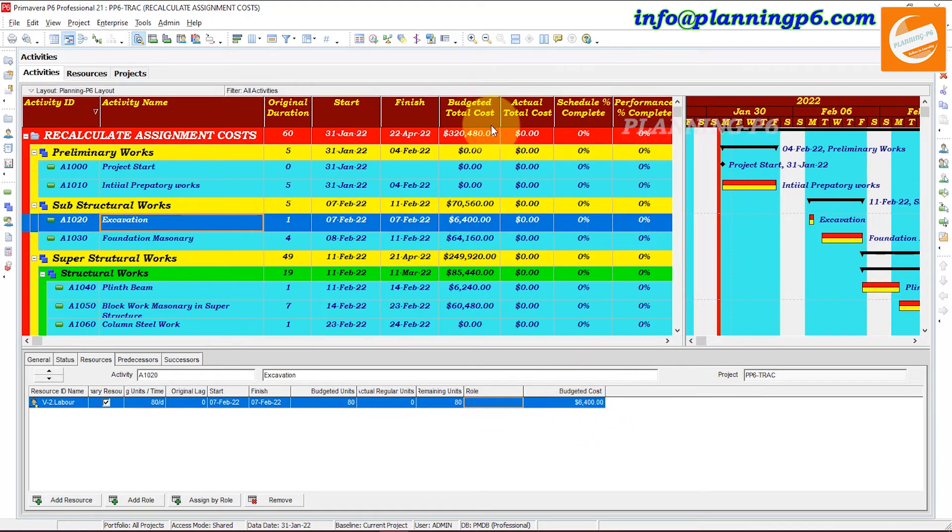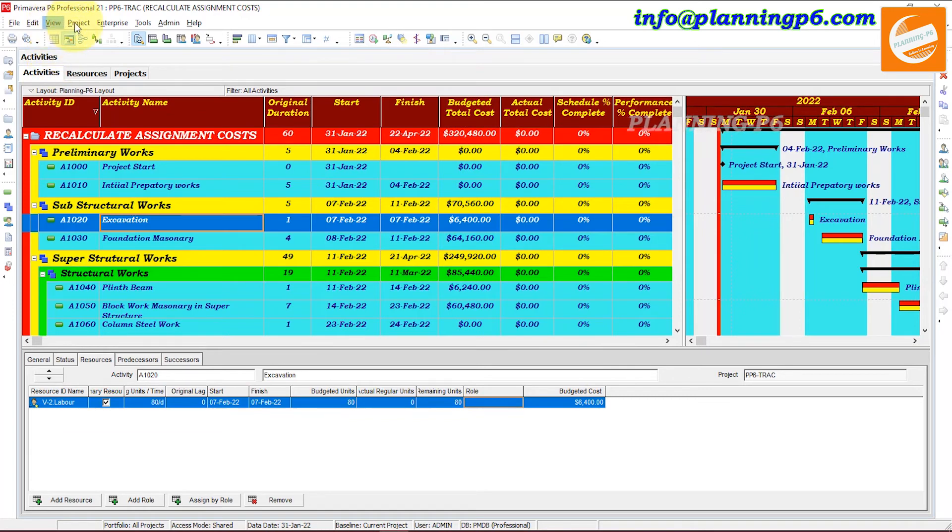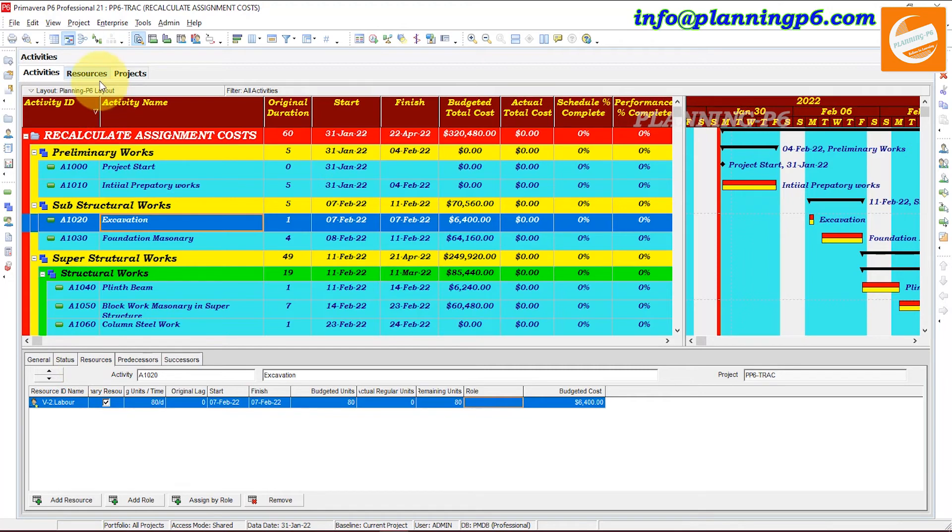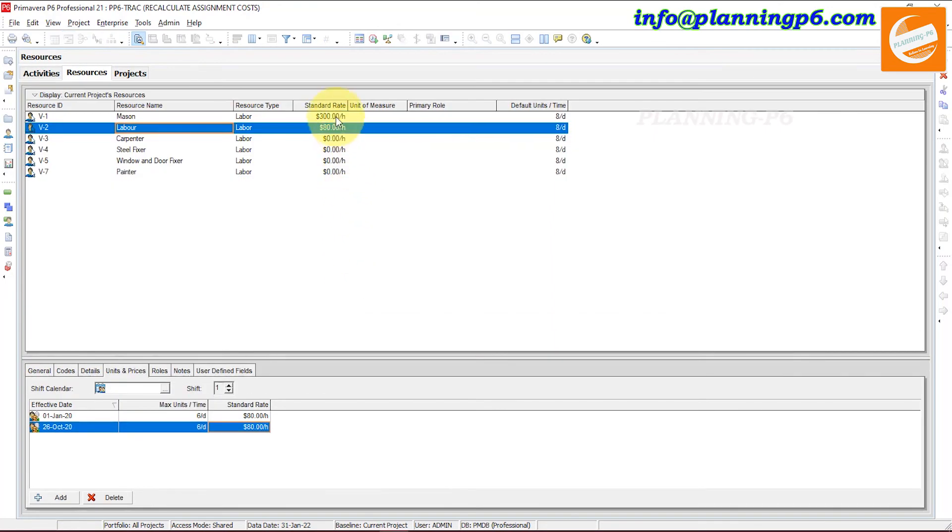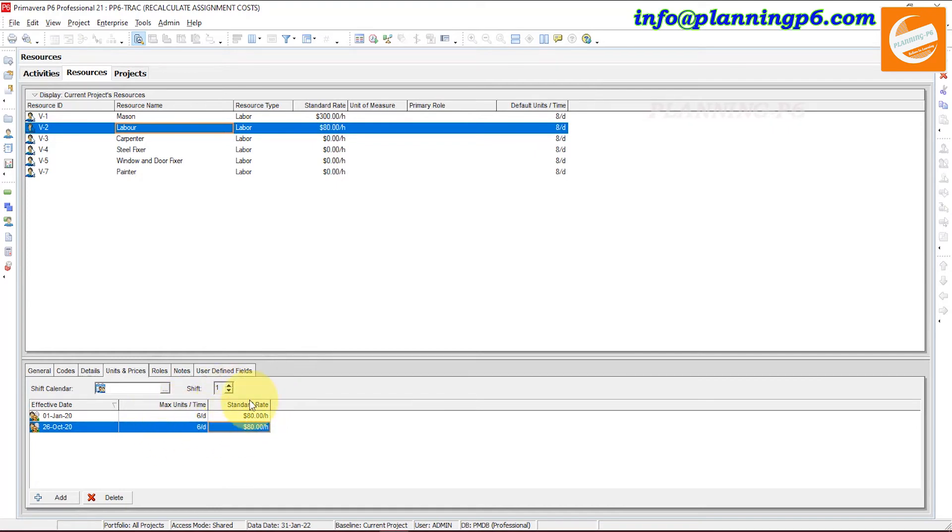Because we decreased the per day limit in hours and in cost as well, it will be decreased by this one and this also has been changed. It's not necessary that you have to change this. You can change by your requirements in the resources. If there are 8 hours, you can keep 8 hours. It is not necessary to change the maximum unit as well. You can change only the standard rate as per your requirements.